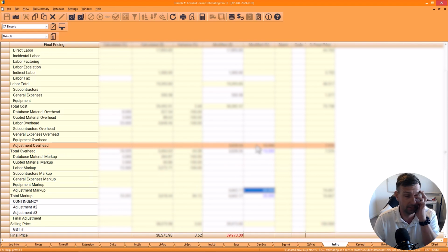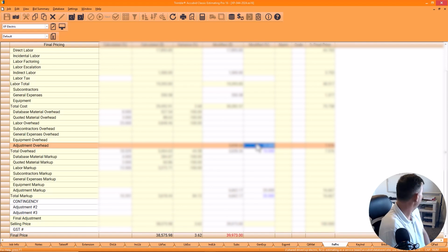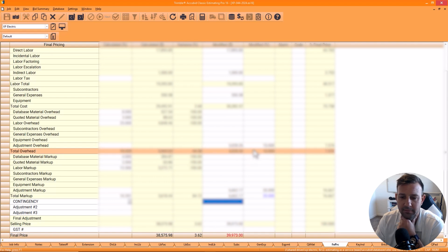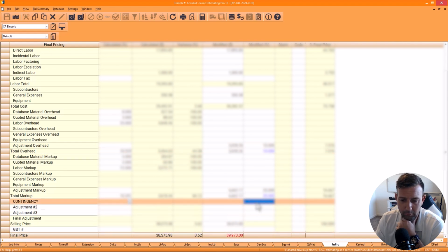the 4 contractors that I know of right now that are bidding the job are lacking coverage. There's one contractor out of Sacramento that I found out is bidding the job. So if they're coming from Sacramento, then that means they have to include travel likely. I don't know what the situation is. Maybe they got someone here, but I don't really want the job that bad. Taking the job at good, fair margins right now would be fine, but I've got a little room and I'm feeling froggy. So I think I'm going to add 15% to the job and call it good and see where it goes.